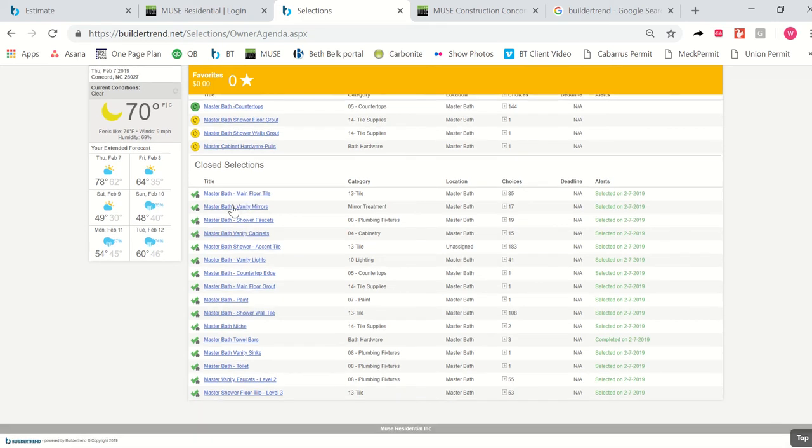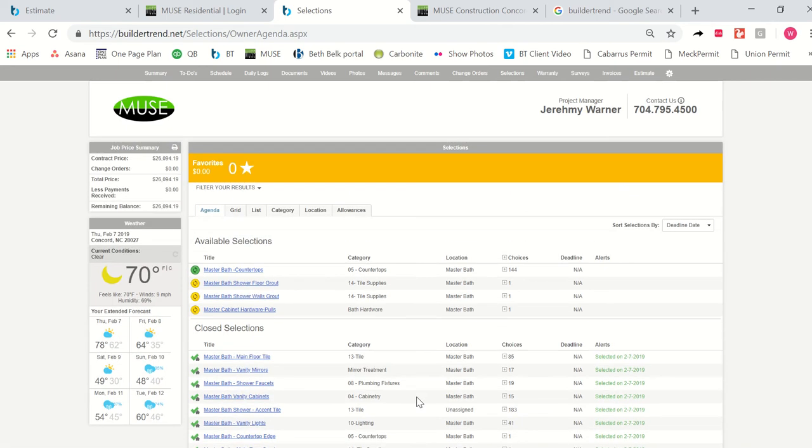Nonetheless, once all your selections are approved and you feel certain that we're all on the same page, these selections will talk to the estimate and update any pricing based on all the new selections we made.